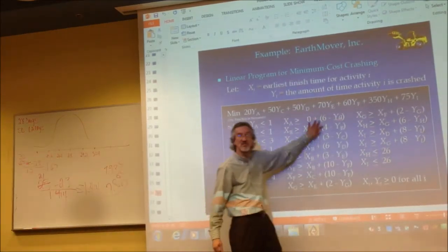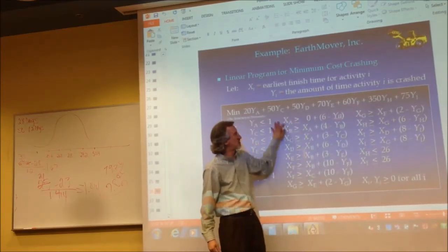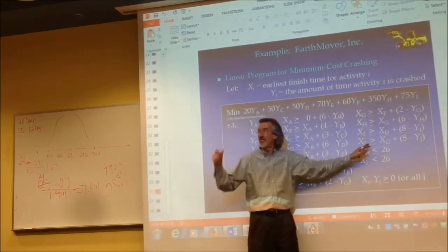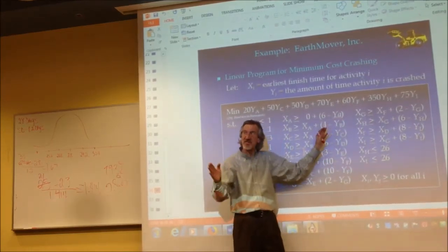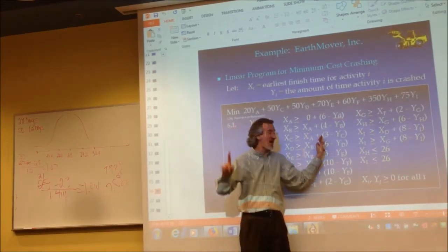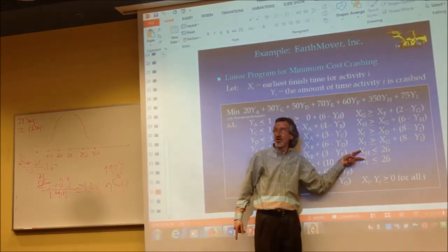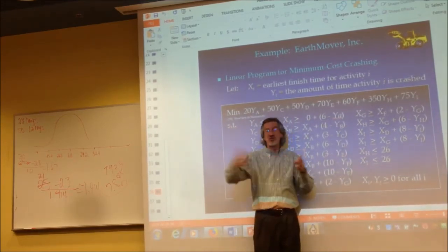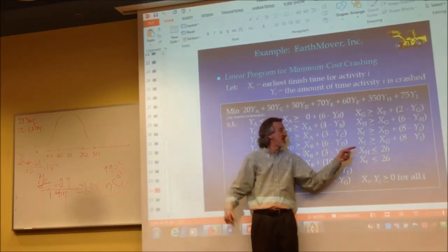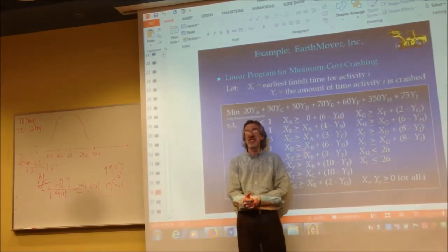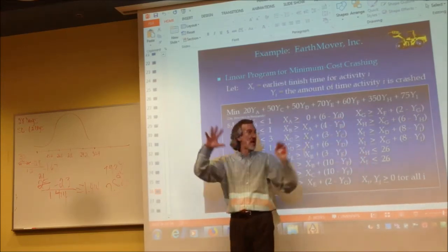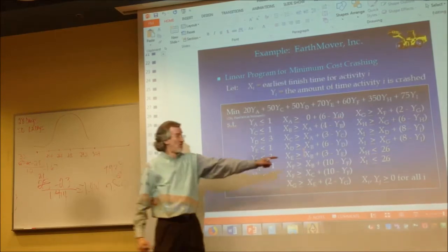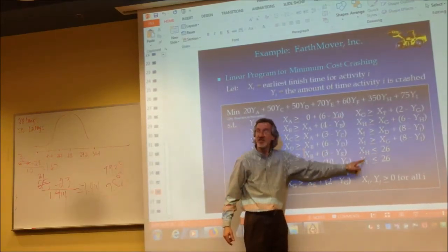are all the activities. When we look at the activities, I was going to show you how this is done. If you take good notes, you can write any of these like that. It's all about the process of how these are designed. But what I want to add is how important these two are. These represent any activities that go directly to the end if you drew the picture, which means that H and I do not precede any other activity. Remember that when we draw these out, the arrows go to the finish for any activities that do not precede another activity? Well, these are the 2 that do not precede any other activity.